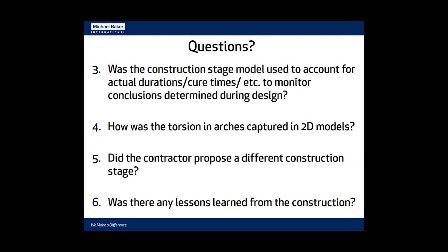Question: Did the contractor propose a different construction stage? Answer: They proposed to erect the bridge in the opposite direction from what we assumed for design. However, the overall idea of erecting the bridge on temporary towers was the same. Although the specifics of tower placement around the railroad tracks and direction differed slightly, the overall method of how the bridge was erected was similar to what we assumed in our modeling.